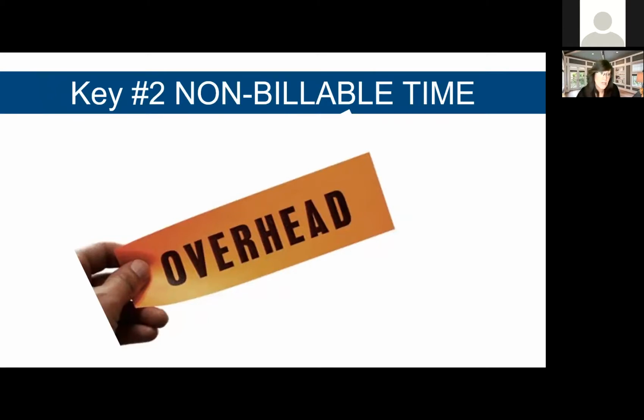And if your utilization rate is, let's say, 65%, that means 35% of the time your employees are spending is non-billable. So the question I want to ask you is, are you getting the value for that overhead time? If they are spending 35, 40% of their time doing